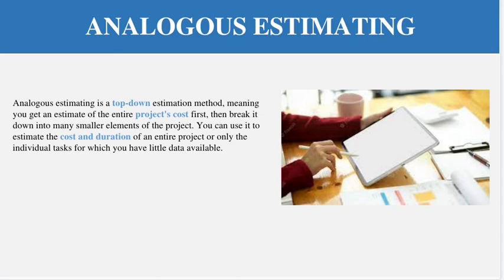Analogous estimation is a top-down approach. Top-down approach means we do the estimation as a whole first. For example, you say six months is required for implementing an e-commerce solution. Then you break it down — for example, one month for planning, two months for development, one month for testing. So based on the overall estimation first, you then break it down into further modules. Top-down means you estimate from the top level and break it down into smaller pieces. This same approach applies to both cost and duration.